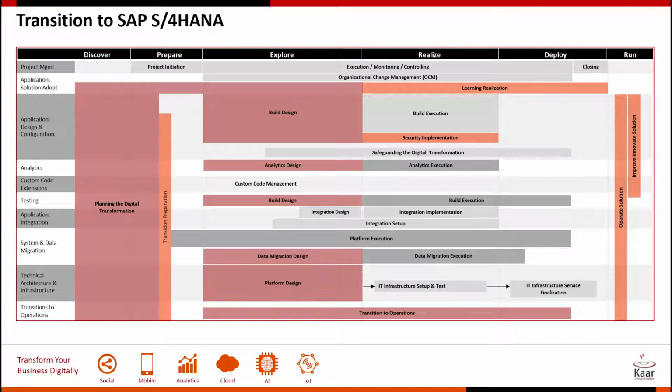Because like I said, a conversion, most of the errors are not the technical errors. They are data-driven errors. And if you have run this conversion on copies of prod, you can rest assured that you've successfully fixed most of the errors before you touch the production. So the only delta would be all the transaction data that has gone into the production system since your last mock run.